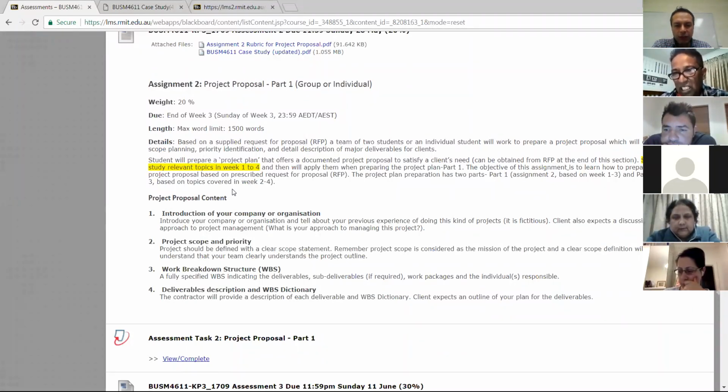Yes, you will need to. It goes for your assignment 3. Once you put your time schedule in the software, you will allocate resources and relevant finance and capital that you will estimate. Then you will put it into the software and you will come up with a budget plan and also a cash flow statement of the project. And then you will report them in your assignment 3.